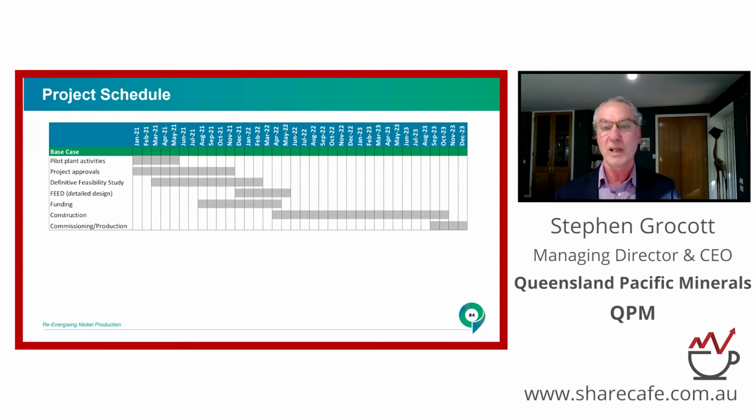So we've got very early engagement with vendors and equipment suppliers. We have got detailed engineering commencing early, and we'll be ordering long lead time equipment early. So we fast track the entire process so that at the end of the feasibility study, we don't demobilize and then start all that stuff. At the end of the feasibility study, we continue, so we don't have to remobilize and re-engage the key engineering partners. We're appointing a debt advisor next month, and we aim to have that debt processes all sorted out by early next year for construction starting just before the middle of the year. 18-month construction and commissioning with first production by the end of the year.